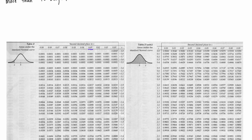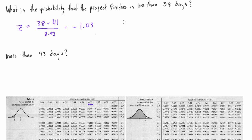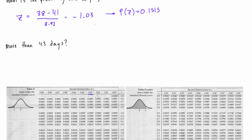Let's write that down. This is giving us this probability, probability of z, this particular z-score is equal to 0.1515. Now what that means is that the probability of landing in this shaded region here on your bell curve is 15.15%, but what does that even mean?